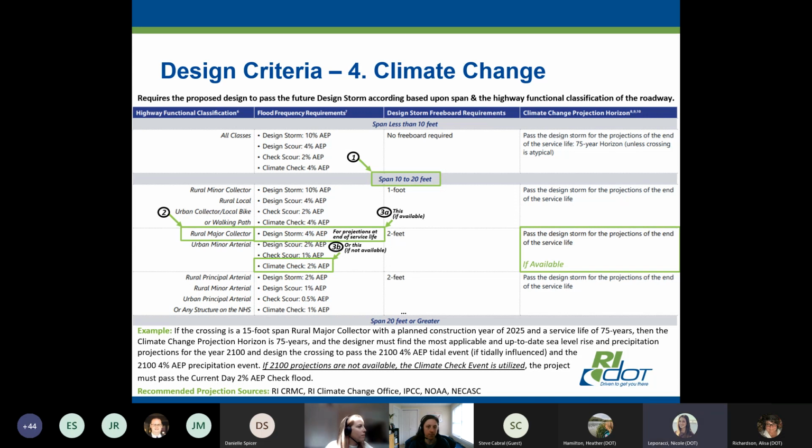You would handle this at around, we'd like to see it at 30%-ish. That's when we're doing a lot of our consultations for NEPA, and we're starting our permit process, like getting together our consultations to Army Corps. So a draft at least would be around 30%, but then a final one probably, and I don't know if Elisa agrees with me, would be more towards around 75% when we're doing permitting. Was that kind of what you were asking, when this would be filled out? Because I know there's a lot of unknowns in the beginning.